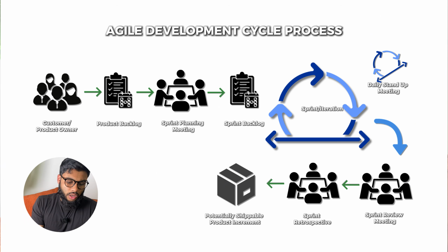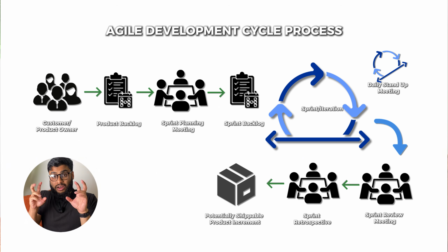When it comes to the law and industry regulations, you want to make sure that you're following them. And if you are working on something that you cannot work on anymore, the product backlog unfreezes and the priorities change, even if it's during the middle of a sprint. But this will only happen when you have a new law that comes into play or when you have a new regulation. Okay, this is something that you cannot ignore.